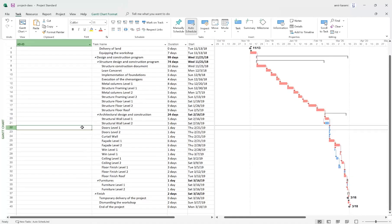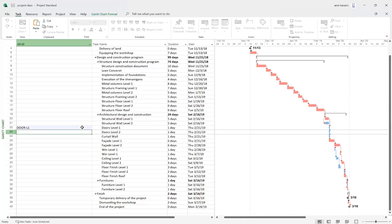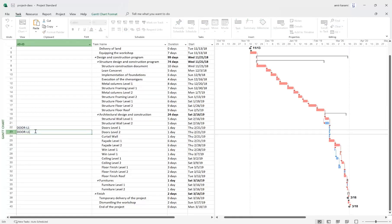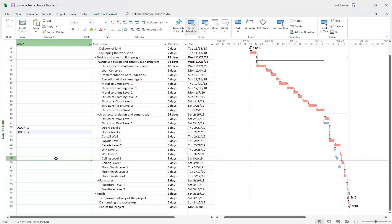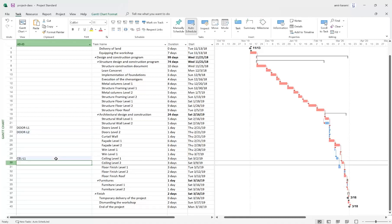Now it's time to assign an ID for each of these tasks. It's your choice — for example, for doors level one I'll say 'door-L1', and for the next level 'door-L2'. For each one of them you should assign a code. For ceiling level one I say 'ceil-L1', and so on.